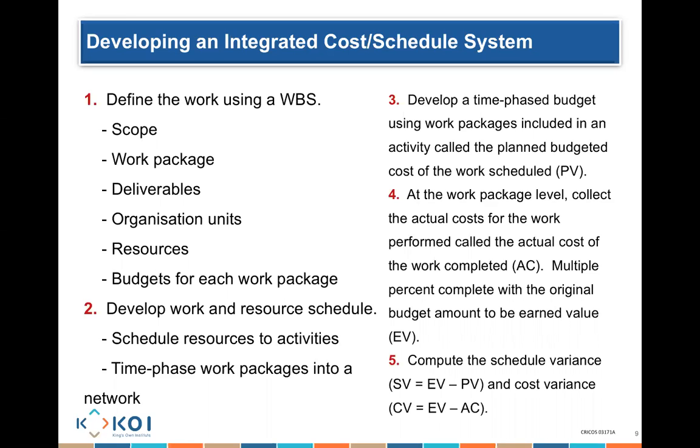I need to know the time phase work package in the network. So in every time period, what am I supposed to be doing at that period of time? When I know what I'm supposed to be doing at any particular point of time, I can develop what is known as a time phase budget.